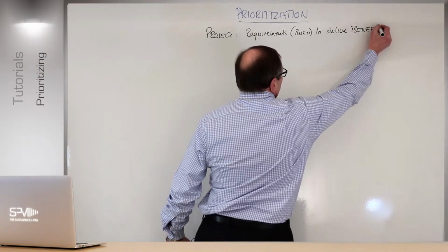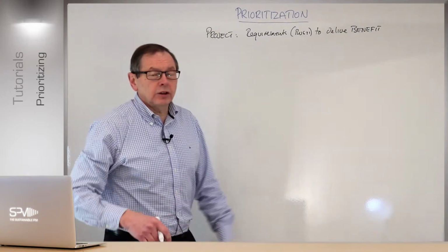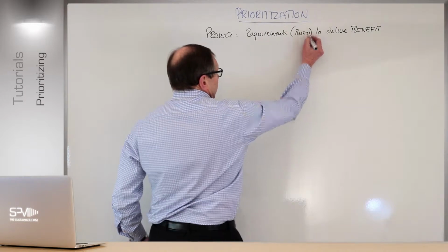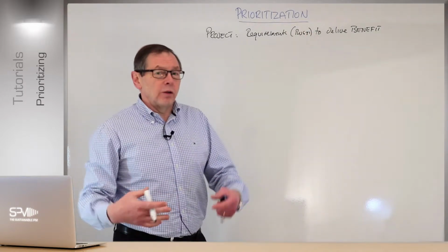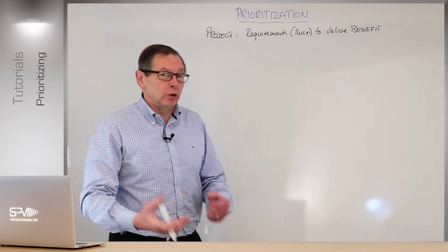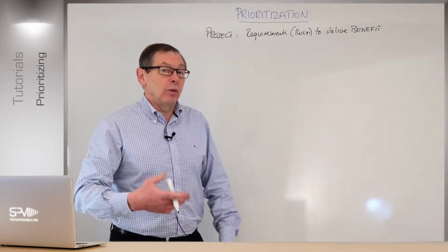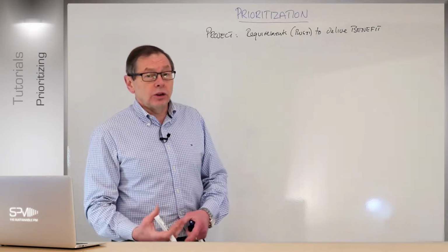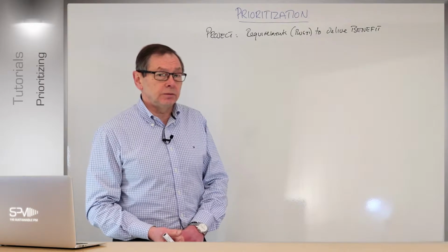These are the ones that are ultimately required. So this is prioritizing, obviously, primarily for the musts, for the requirements we must deliver, but all the other ones are therefore in order of priority. Those that we must deliver, they ought to have there, but painful to leave out type of thing. In other words, we can have workarounds. And then the coulds, which are the icing on the cake type of thing. And it's those could haves that become our contingency.